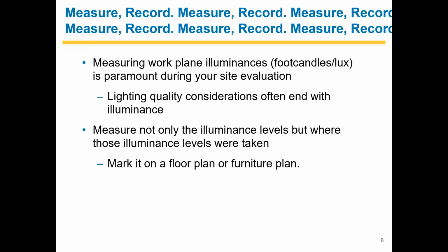The other big benefit that we see, again, in this site evaluation stage, is noting where our measurements are taken and recording them with a lot of detail. It struck me first as a pain in the neck, but really, once you have that documentation on hand and you can recreate it, after the retrofit, if the customer starts having issues with tenants making complaints, having that information that things have not changed substantially is a great way of making sure that you're not putting your neck out there and accepting unnecessary risk.